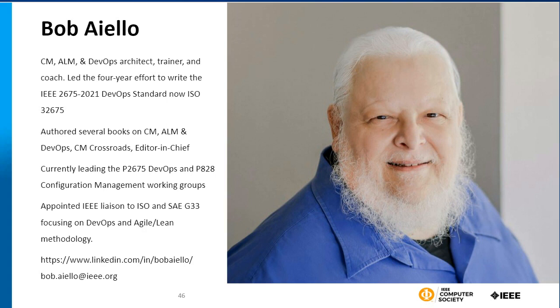So the business end user said to me, I'm okay with taking the risk that we may crash every day for the first week. But I really want to get out there and be first, because our salespeople are going to rake it in if we're the first ones that introduce this new technology. So he taught me that the risk of not putting this buggy software out there was far greater than the risk of putting the buggy software out there.